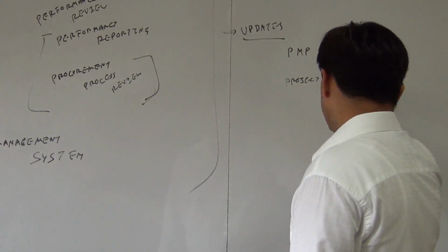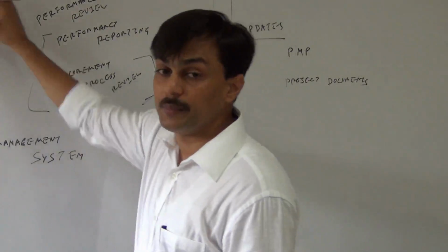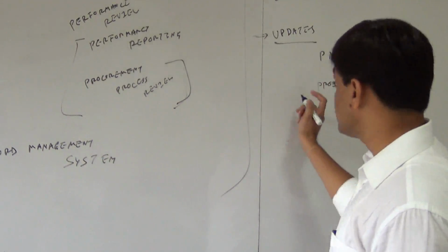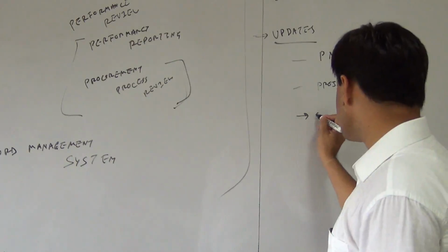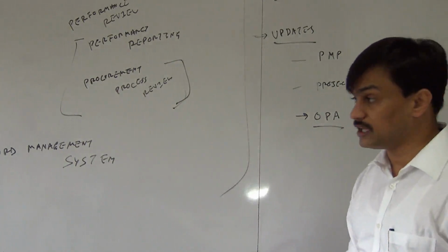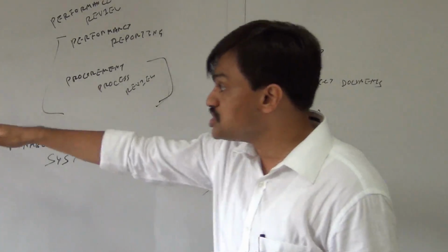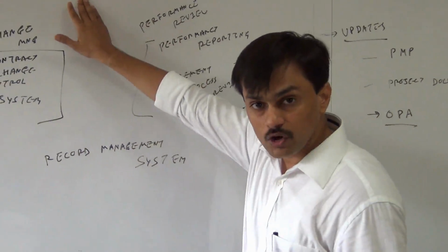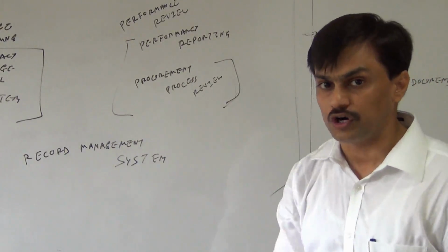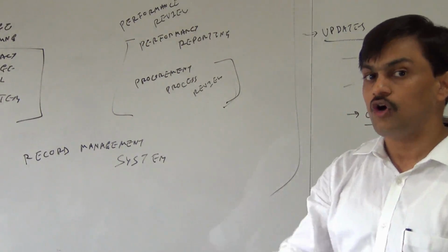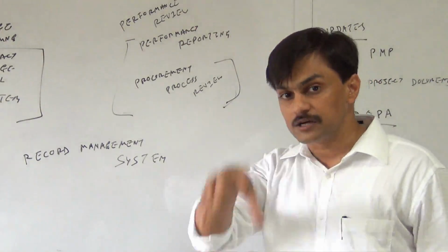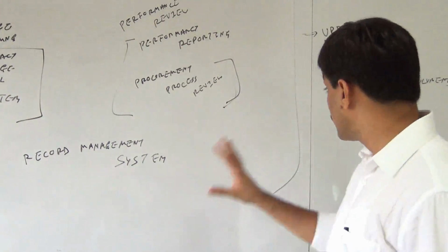Since we are doing good amount of learning, good amount of documentation work in this process, the project documents may get updated. And third, organization process assets. They may get also updated on the basis of the change control learning, the inspection and audit learning. We may recommend going forward whenever we do a procurement contract for this particular area, we also need to conduct a given inspection. So those kind of recommendation, those kind of learning can go here.